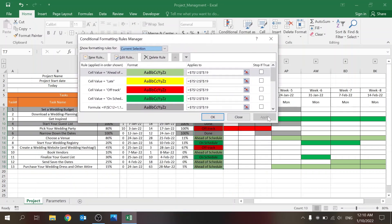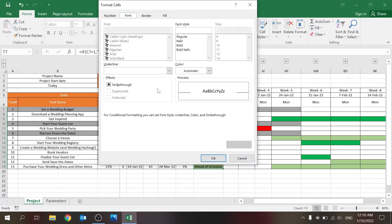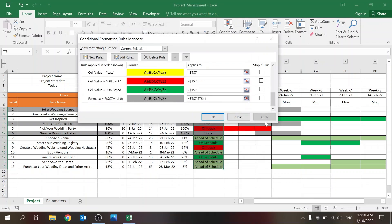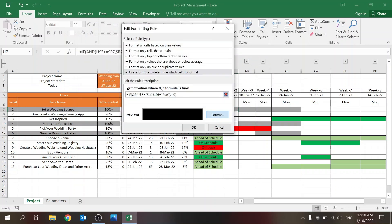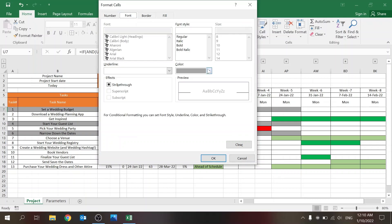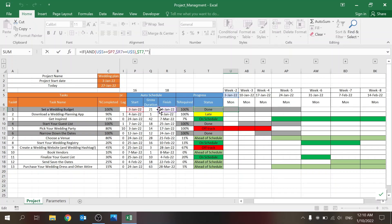All the color coding is conditional formatting. Each status has its own color. One difference in the Gantt columns: I don't want to see the text, so I also set the font color to match the fill color. The formula is simple: if the date falls between the task's start and finish dates, set the cell equal to the status text; otherwise leave it blank. If you removed that formatting, you'd see the word 'Done' in the cell.